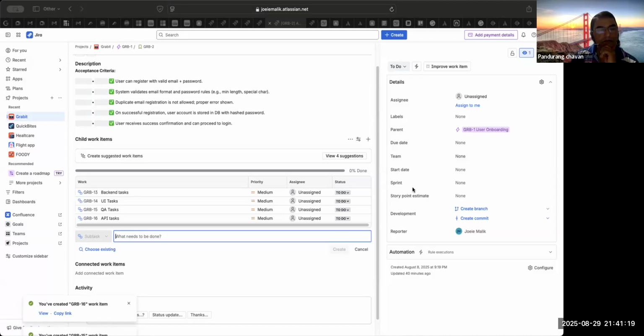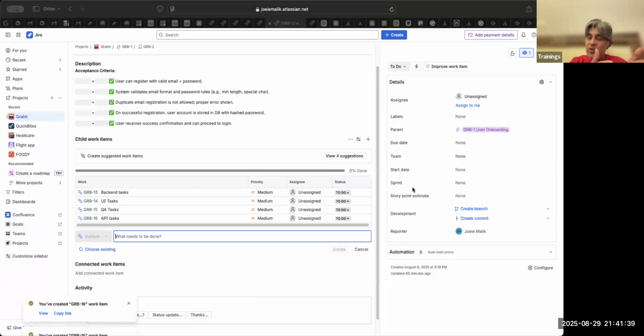Okay. So what am I doing after this? So the story's acceptance criteria is cleared. Then tasking is done. After these 2 activities are over, the third activity in the grooming call is that the Scrum Master says, now you all understand the story. Let's do an estimation. Estimation is you are not trying to find the time of a story. You are trying to find out how much effort, how much uncertainty, how much risk is involved compared to a baseline story.